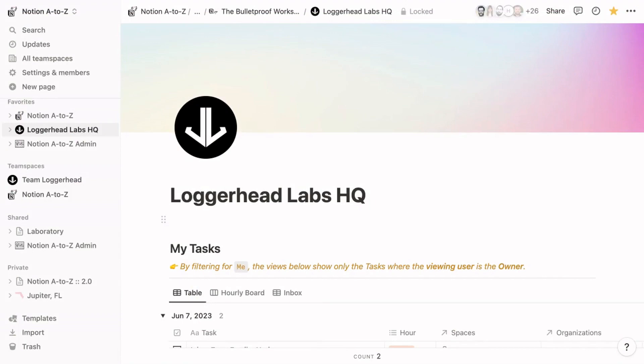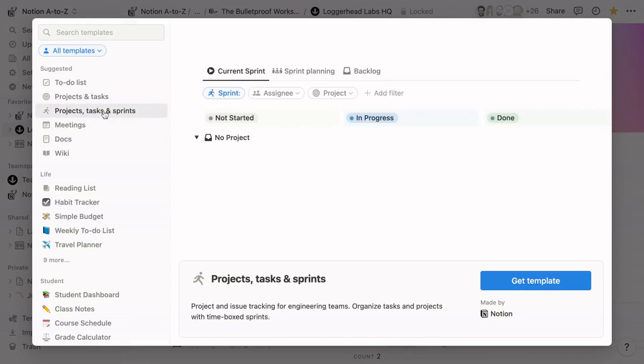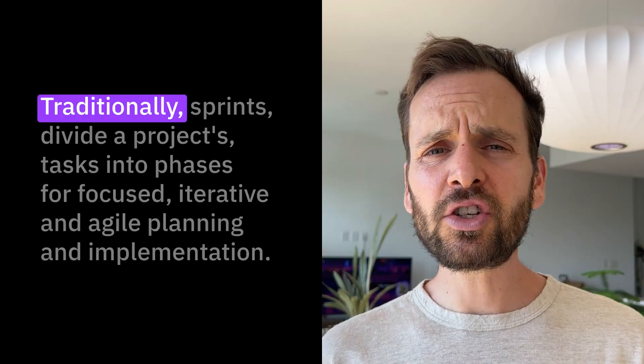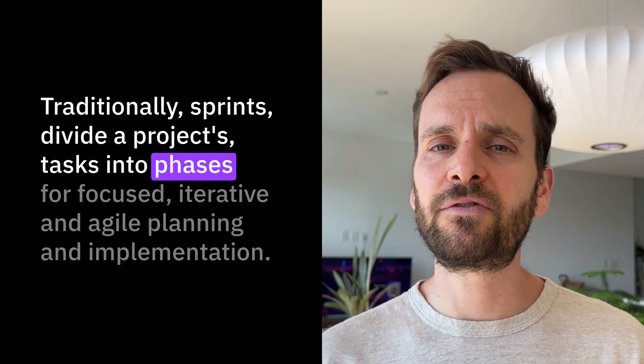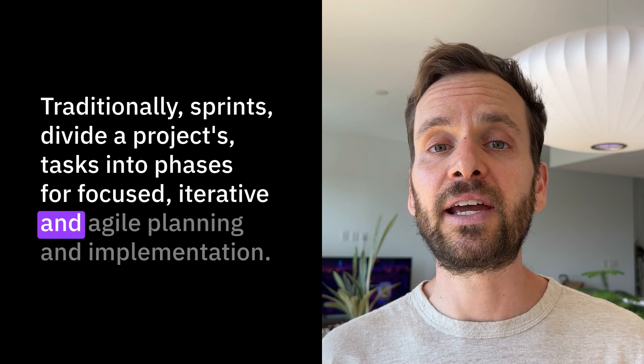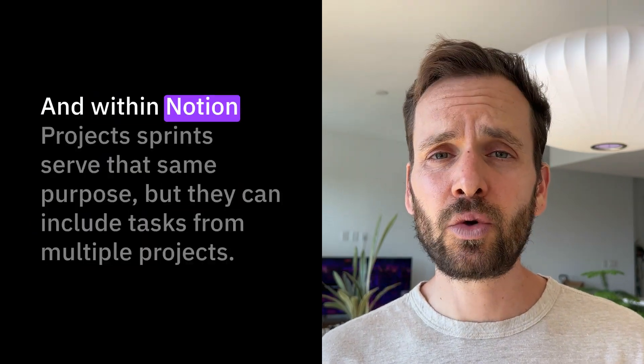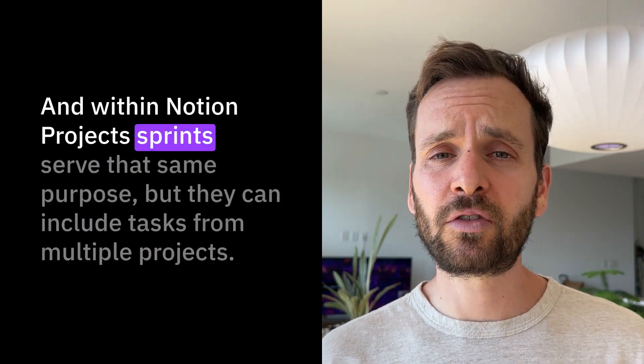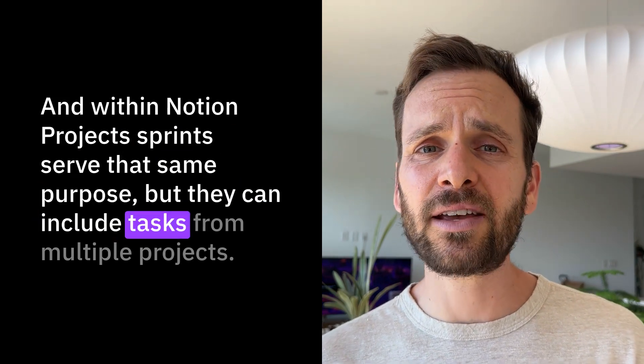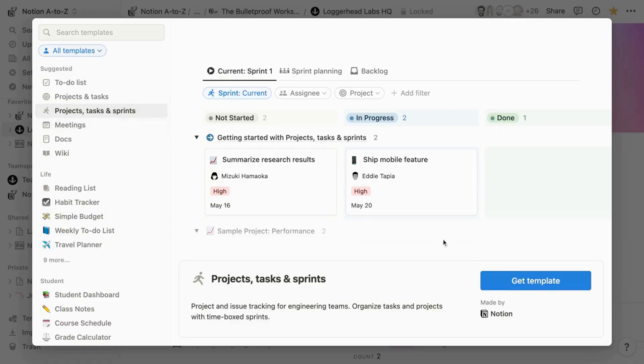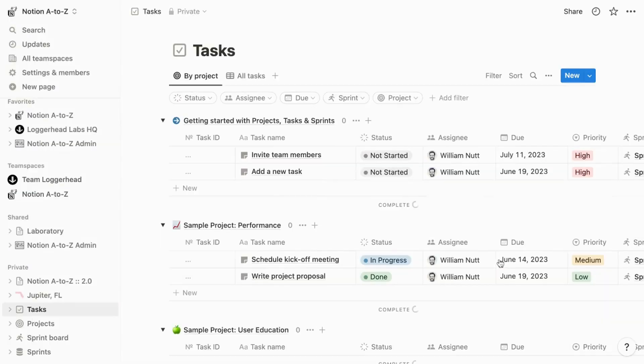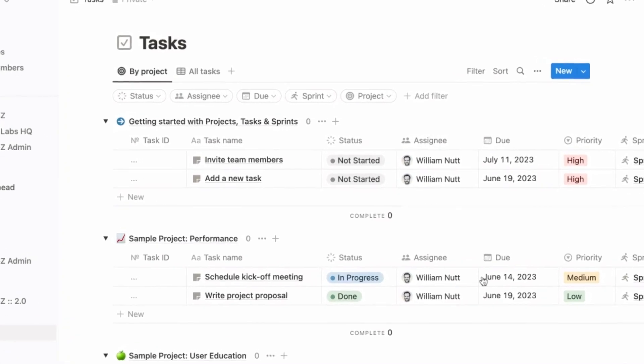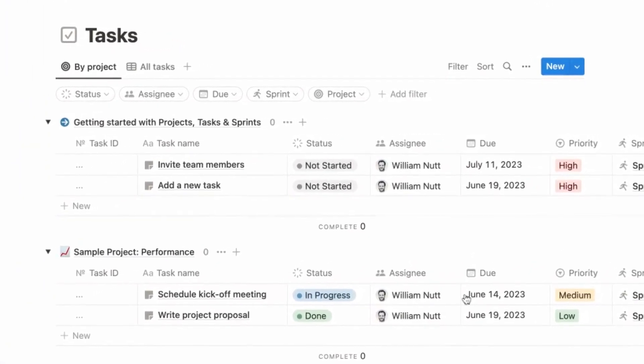Notion Projects is a set of pre-configured databases. If you browse to templates from your sidebar, you can choose Projects and Tasks or Projects, Tasks, and Sprints. The concept of Sprints comes from the Agile Project Management methodology. Traditionally, Sprints divide a project's tasks into phases for focused, iterative, and agile planning and implementation. Within Notion Projects, Sprints serve that same purpose, but they can include tasks from multiple projects. When you choose the set of Notion Projects databases you want to use, Notion will add them to your workspace, and they'll be pre-configured with properties and pre-populated with sample content.